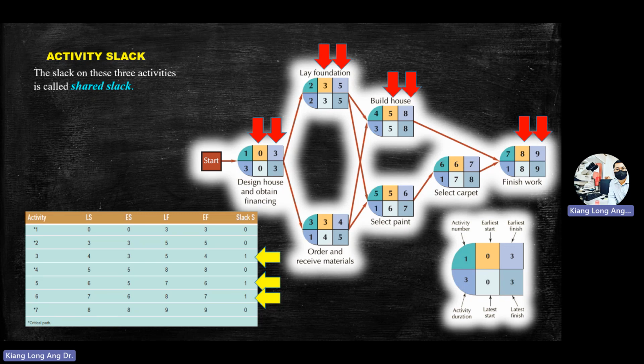If the numbers in the column at the center are the same, for example, the one you see on the diagram with the red arrow, 0, 0, 3, 3, 5, 5, 8, 8, they are the components of the critical path. It's like a landmark, like Penang to KL. You will pass through Bentong and Ipoh and all this. So this is number 2.